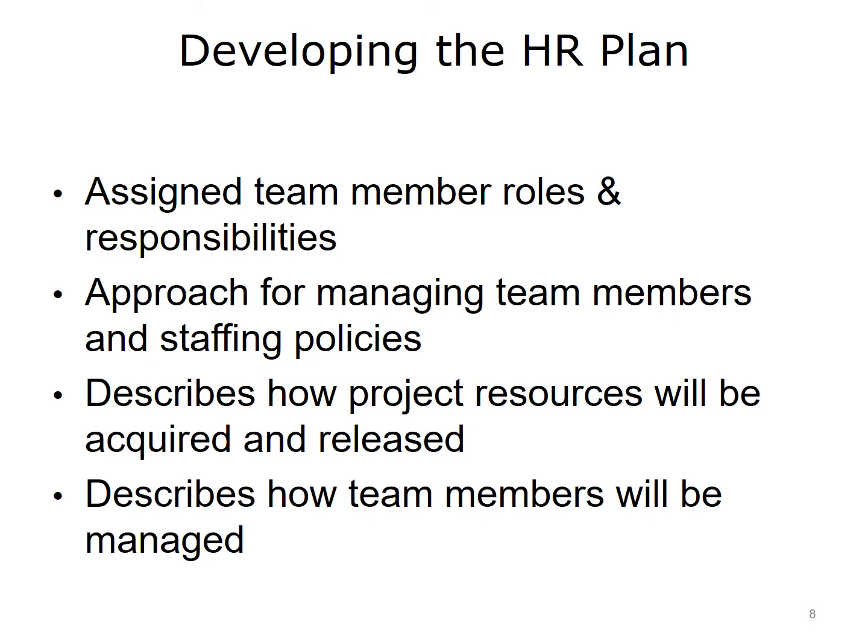Also, you must take into account the existence of established organizational processes. These can be greatly beneficial. If your organization already has a clearly defined process for project management and HR plan development, you will find it a much easier task to create the HR plan. At the point of developing the HR plan, it is essential to identify and describe the types, quantities, and timing of the resources required for each activity in a work package.